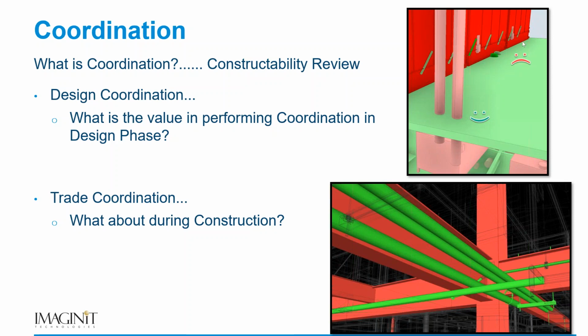If I identify a location where I've got to make a change, that change has impacts upstream and downstream. It always does. In this case, you've got roof drains, you've got the piping that has to go somewhere. If that causes a clash, you need to detect that and figure it out so that you can move it, and we can do that as early as possible. In doing so, we're reducing those questions that happen downstream. We just identified those RFIs, right?